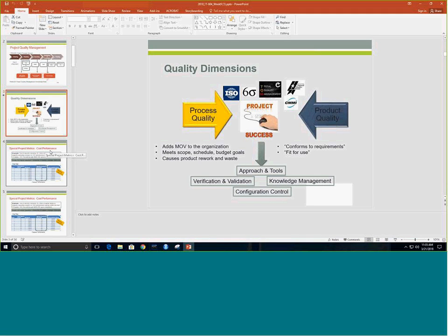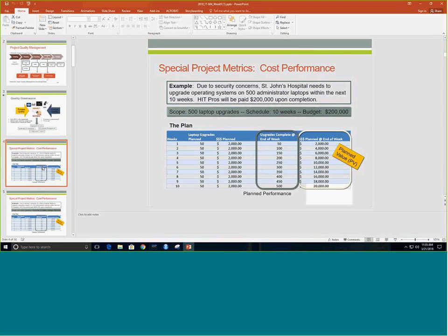Then there is not just the process quality and the product quality that we need to consider, but we also need to consider the quality of you as the project manager. And the product quality is measured through cost performance and schedule performance. That we have cost performance indices and schedule performance indices, or the CPI and the SPI of the project, which of course changes or adjusts itself every single time that we measure, and which should be close to 1.